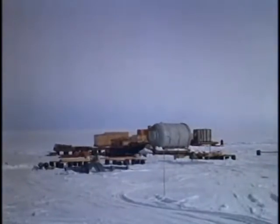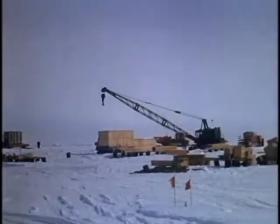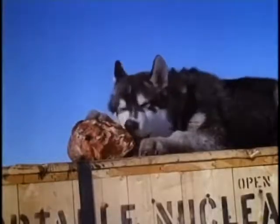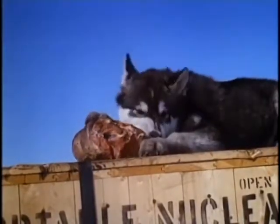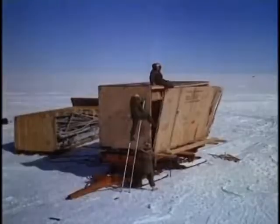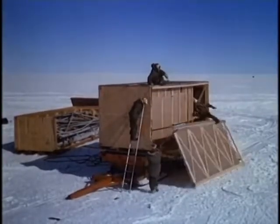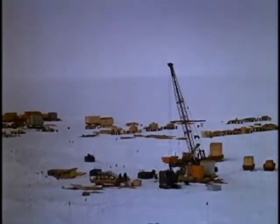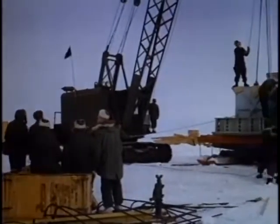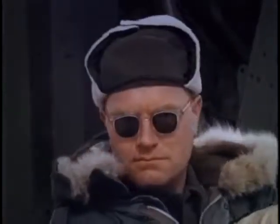Work began immediately unloading the shipment in preparation for its emplacement. Covers were removed, crates opened. None of the excitement affected Muckluck in the least. Boxes of piping and wiring, each item carefully labeled, were opened so that each unit would be available when needed. Major components shipped in pieces because of weight limitations were reassembled before being moved into the trenches.